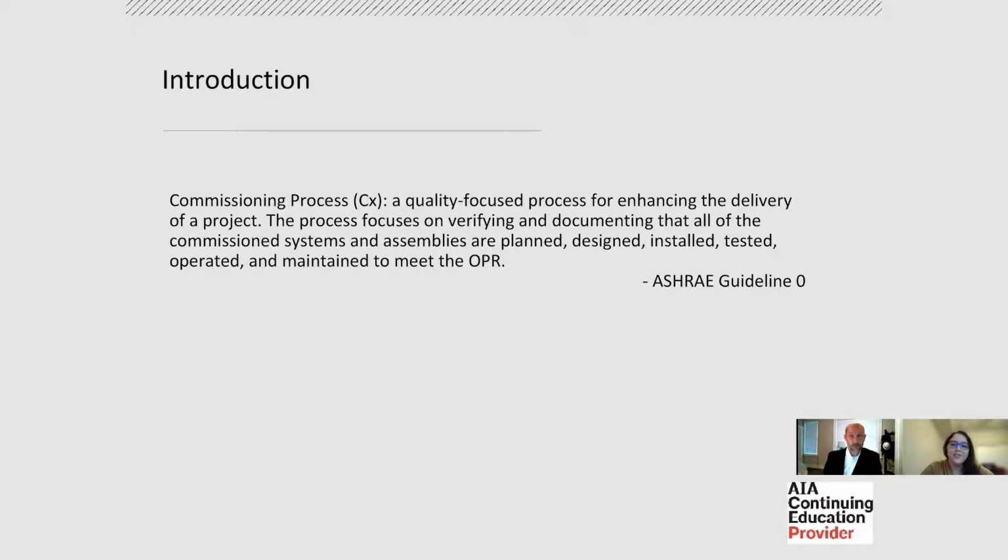the designers are going to design the system and set the parameters and define the requirements and system capacities and functionalities and features. But it's less likely that the design team is going to show up on a job site and formally test a system to make sure it actually does what they designed it to do. Yeah, from my experience, the design team specifies requirements, but only rarely confirm that compliance through testing.